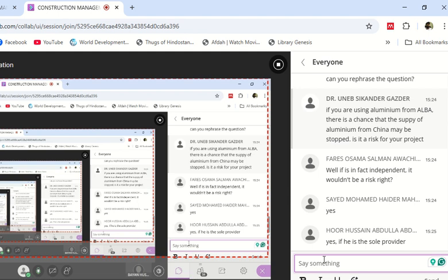So I gave you three examples here, right? One was breaking down of the equipment. It's uncertain and it is related to your project. It's a risk. The second example was resubscription of the software, or the ending of the subscription of the software. It's not a risk because it's not uncertain. It is for your project, but it's not uncertain. Third example, the closing of the factory in China from where you are not dealing with any material. So it is uncertain, but it's not related to your project.